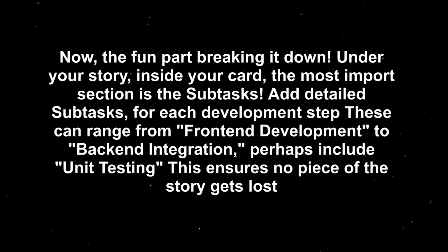Now, the fun part, breaking it down. Under your story, inside your card, the most important section is the subtasks. Add detailed subtasks for each development step. These can range from front-end development to back-end integration. Perhaps include unit testing. This ensures no piece of the story gets lost.